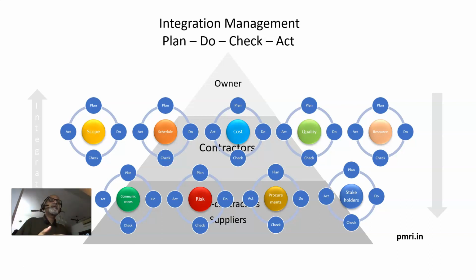If you take software, there will be an engineering plan, a quality assurance plan, and a documentation plan, and everything must be synchronized. So is the case with EPC projects. We have an electrical plan, piping plan, plumbing plan, exteriors plan, and interiors plan, and the real construction plan. So all these things must be dovetailed into an integrated project plan.